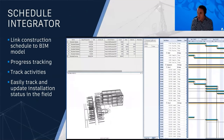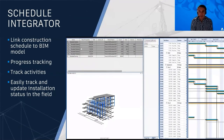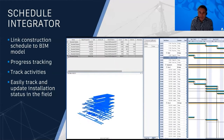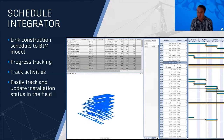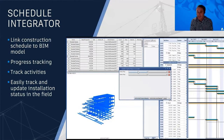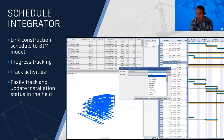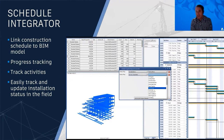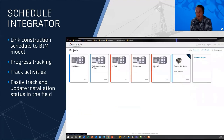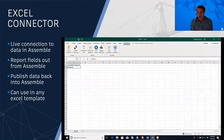The Schedule Integrator plugin allows you to place Primavera P6 side by side with Assemble, multi-select activity IDs and instance IDs from the model, and link the two together. As the programme changes, you can sync those data fields back across to maintain a dynamic, live link. It's a side-by-side integrated view that makes mapping activity IDs to particular model instances straightforward, though there is some setup work involved in the first instance.